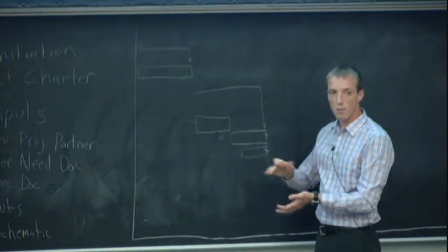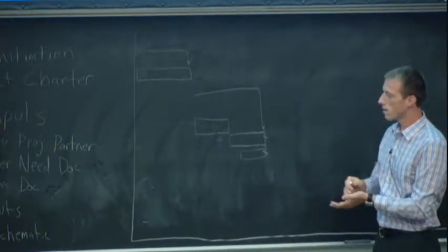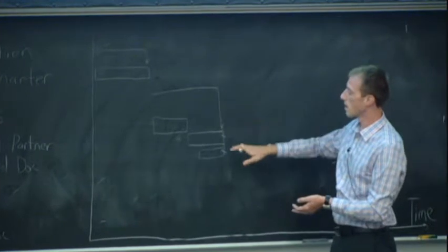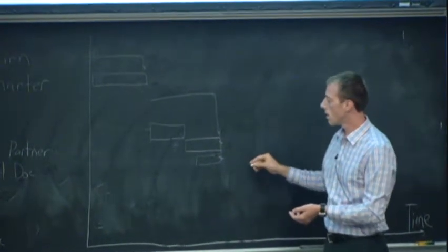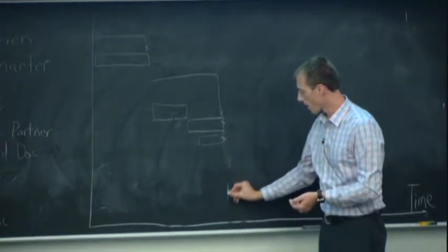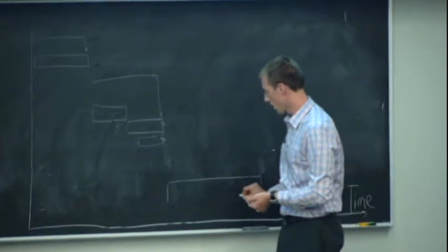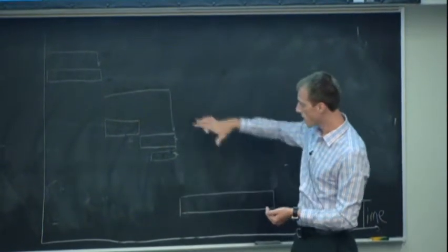And as you build this in more detail, this is obviously a very high-level example, then you can start to specify what's series and what's parallel, what has to start to finish and what has to finish to start, things like that. You can go on and do this again. So I'm going to start developing schematics. That's going to take a really long time, but I'm not going to start that until I've got my specifications done. Okay? So this is the basic form.